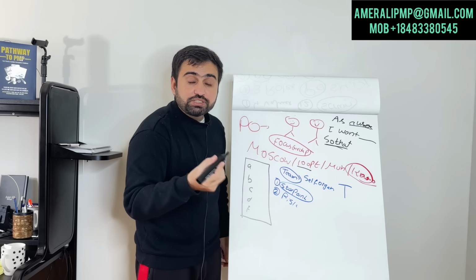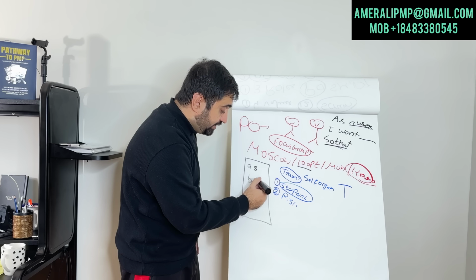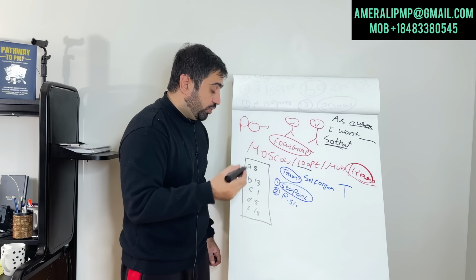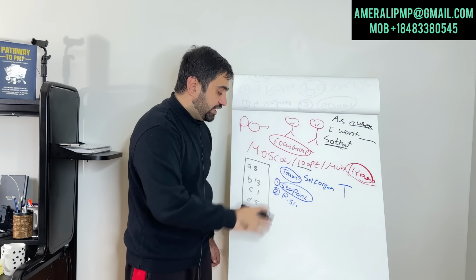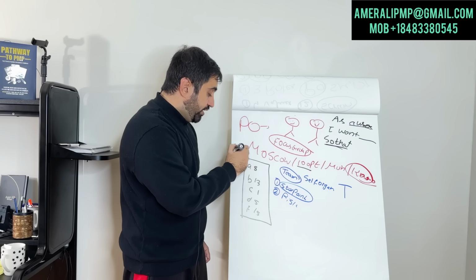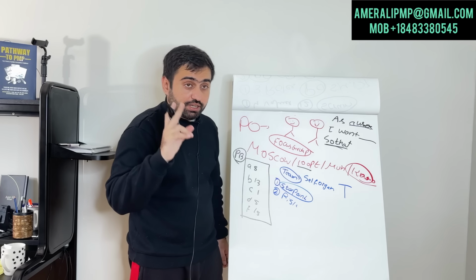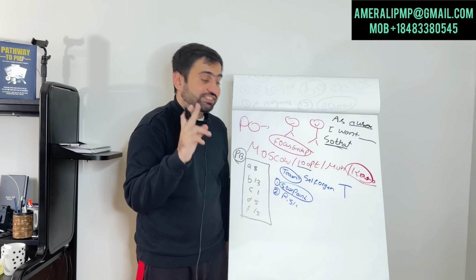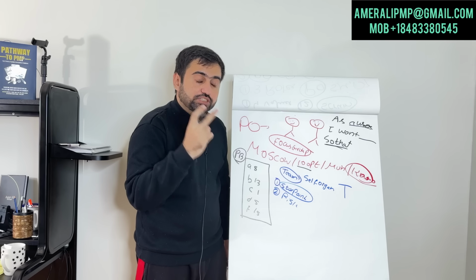They put how much risk is in each user story. Let's say this is 8 story points, this is 13, this is 1, 5, 15, whatever the story points are. This is high value, high risk, low value, medium risk, etc. Now my product backlog is prioritized by high value, high risk. This is even before the first sprint. The sprint has not yet started. You have prioritized the product backlog, you have the story points in it.